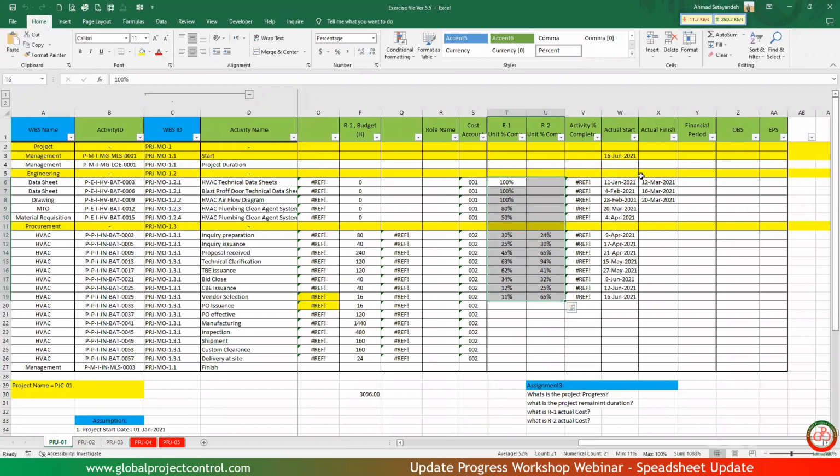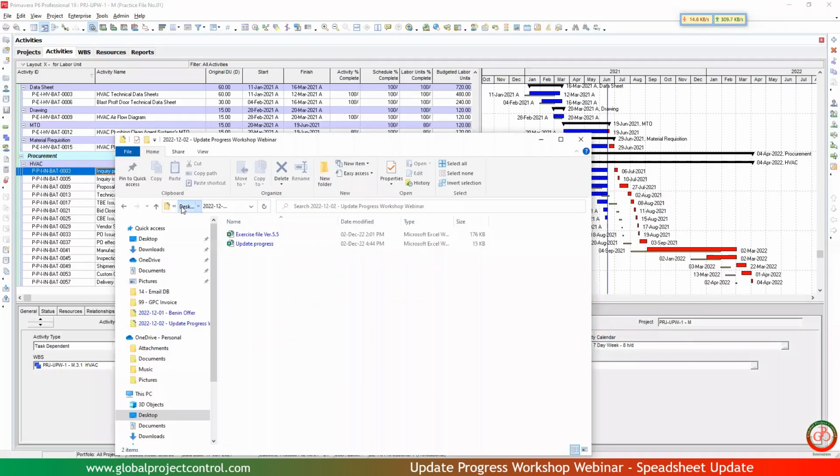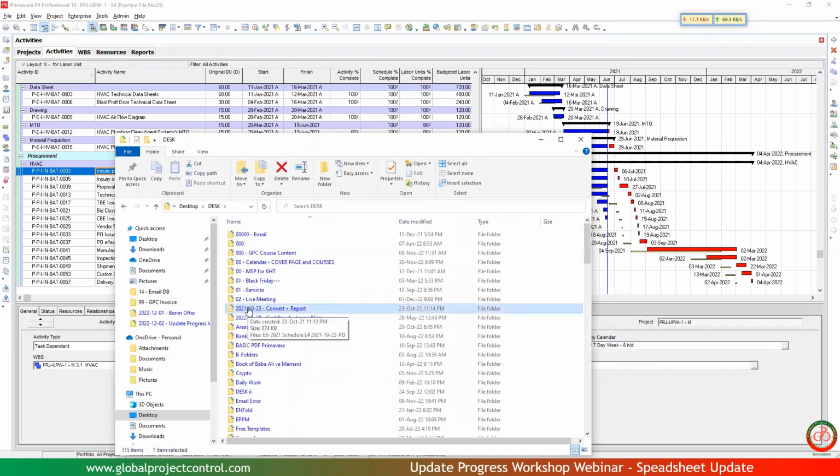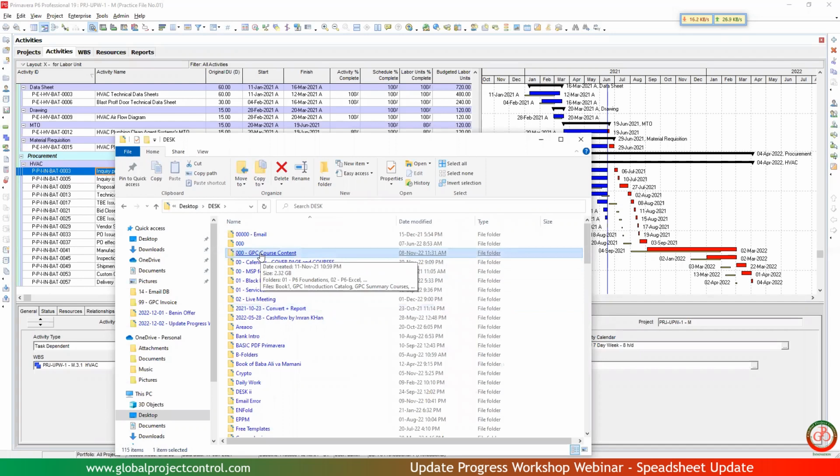For example, sir, if we have a task loaded by equipment, the actual units, the actual hours for non-labor, equal the unit percent complete multiplied by the budgeted non-labor units. So the progress made by the labor is the same progress made by the non-labor.